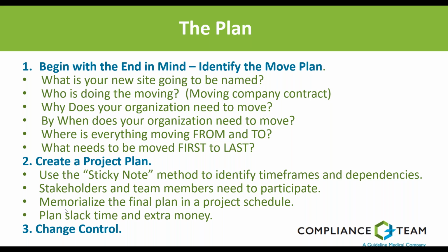Are you going to have 50 little change controls with fewer change actions? Or are you going to have something in the middle, like, I don't know, 5 change controls, one for facilities, one for utilities, one for equipment, one for process validations, one for regulatory actions, and then you group it that way. So think about how that works in your organization, because every organization is different and there are advantages and disadvantages of each, and you just need to think about how that works for you.